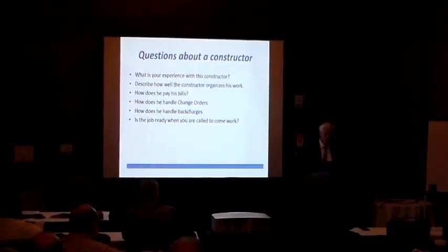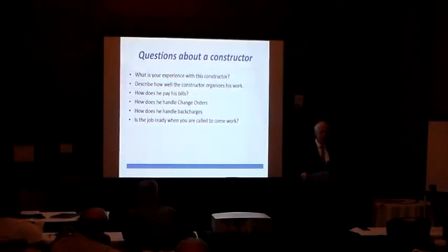The sheetrock has been examined, it doesn't have holes or dings in it, so I don't have to paint the wall 3 times when I only figured on 2, and I can go in there and make some productivity. That painter's going to price that contractor accordingly, and that will come back and reflect in the bottom line of your job. So you want to get to that level of detail and ask people those types of questions.